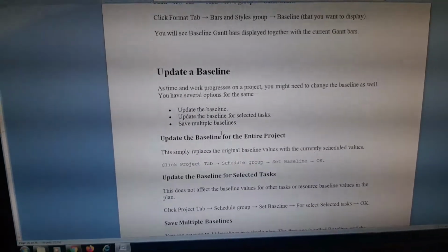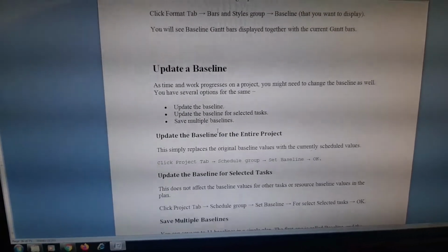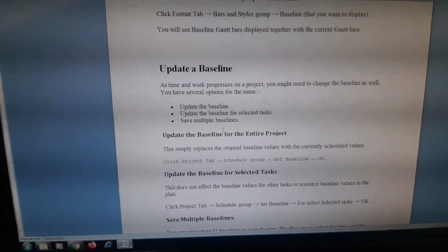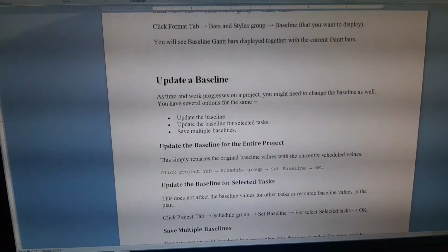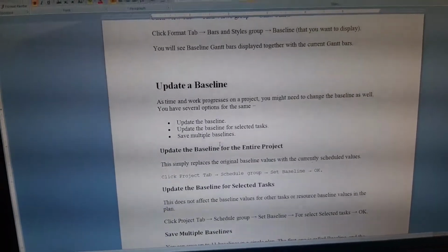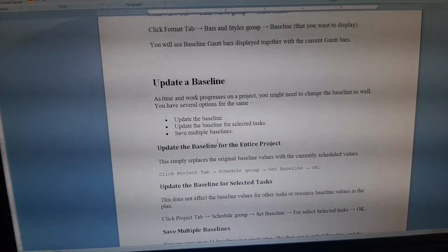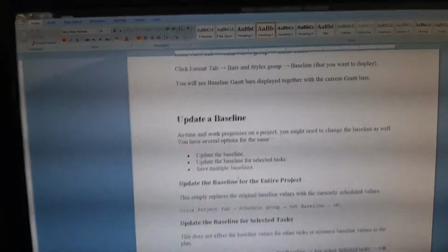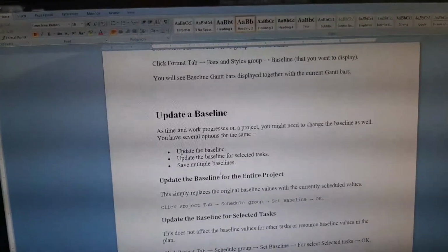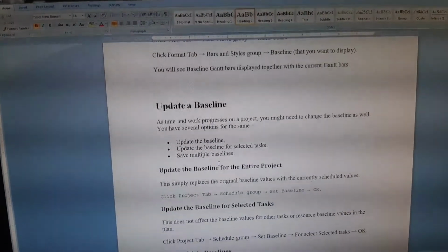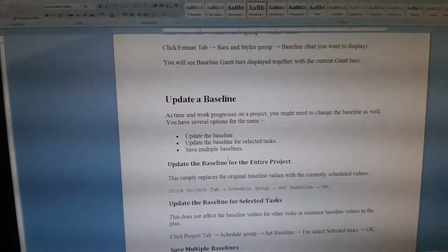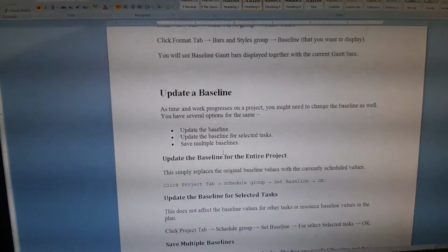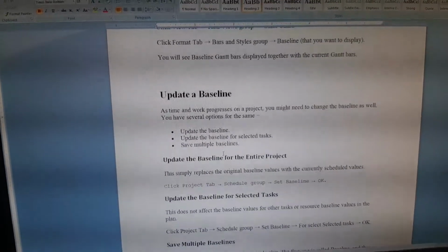On the basis of the baseline schedule only, you need to track all the activities. While tracking with respect to the baseline schedule, you need to mention a comment also when you have an actual. For example, on the 5th of May your excavation was supposed to start, but it started on the 10th of May. For that 5 days difference, you need to have a reason also.